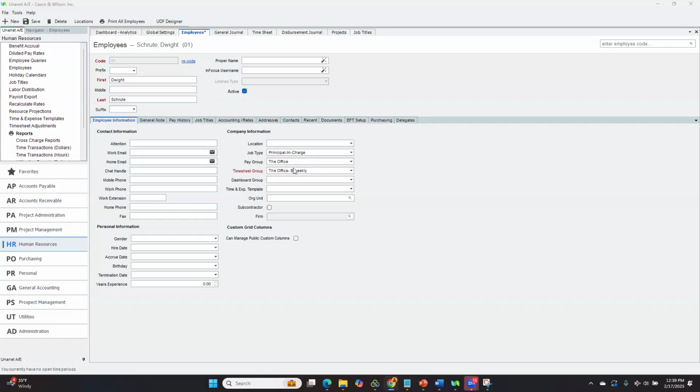Yeah, and I've done some education, but I get pushback from some individuals on fixed fee projects. They're wondering why they need to enter a timesheet on fixed fee. I said, well, it's not going to give you accurate financials on the project. Right, again, that ties into project management. A lot of firms will tie their hours into making sure that they've covered the WIP when they're choosing the percentage. It's important for the project manager to see that when making billing decisions.